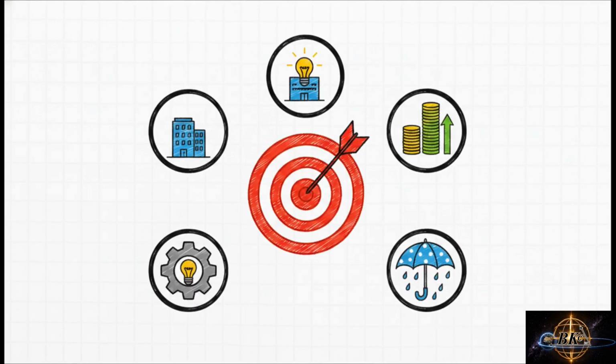Once you know those risks, you apply your markup factors. This is how you find that sweet spot, that perfect competitive price that ensures the lights actually stay on at headquarters. We factor in home office overhead, our desired net margin, and those risk contingencies we just talked about. But we also have to look outward, right? What is the current market saturation? Who is our competition? We also look at value engineering. Are there smarter, cheaper ways to execute this design that give us an edge?